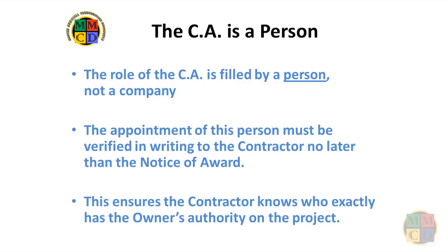This relates to one of the fundamental concepts underlying the MMCD, that the CA signature is good as gold. That is, once the contractor has the CA's signature on a form, it cannot be arbitrarily withdrawn without risking a dispute.